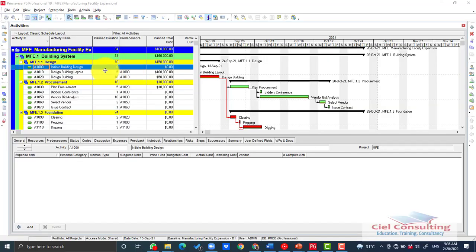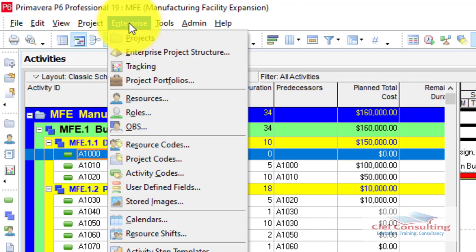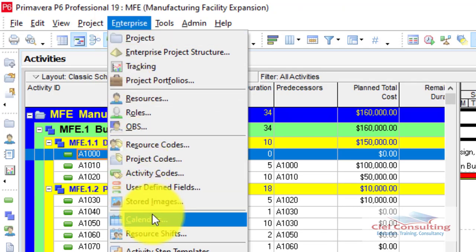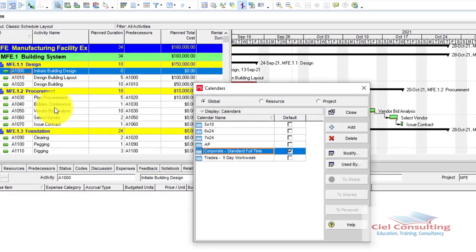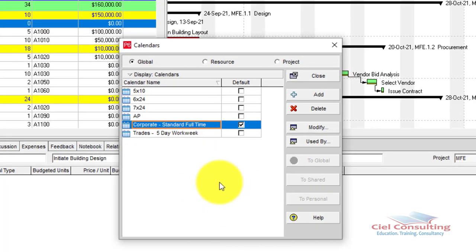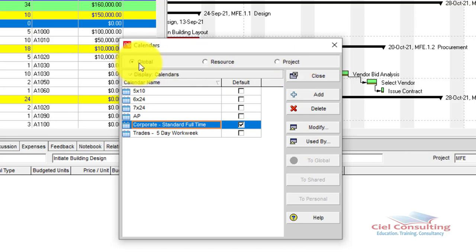To create your project calendar, first go to the Enterprise menu and click on it. It will drop down and you'll see Calendars. Click on Calendars and the Calendars window pops up. You'll notice there are three calendar categories: the Global Calendar, the Resource Calendar, and the Project Calendar.